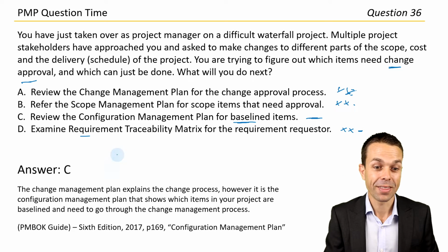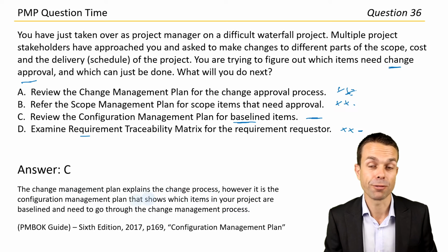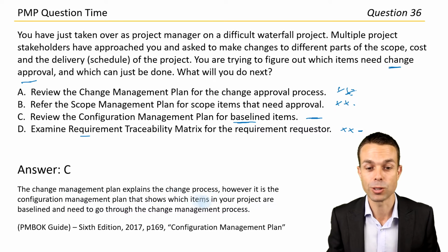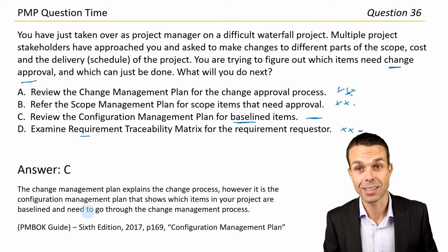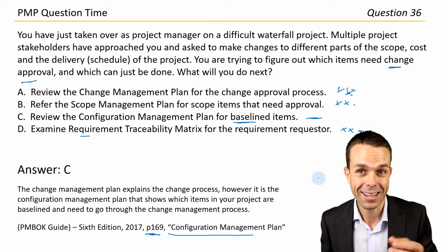And there it is. The change management plan explains the change process. However, it's the configuration management plan that shows which items in your project are baselined and need to go through the change management process. So there we are, page 169, configuration management plan, if you want to check that out for yourself.